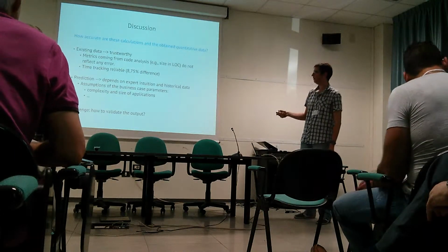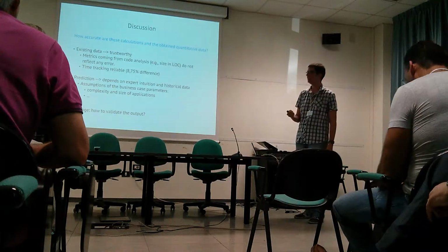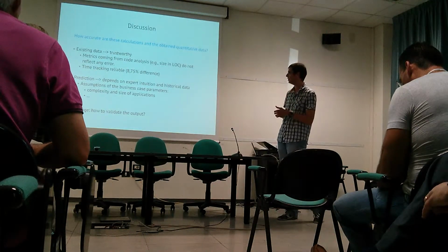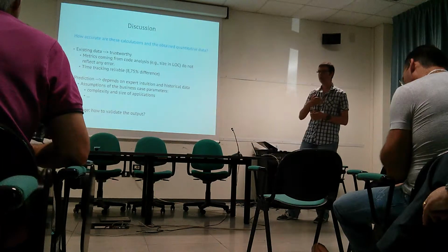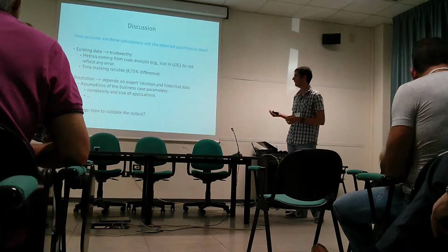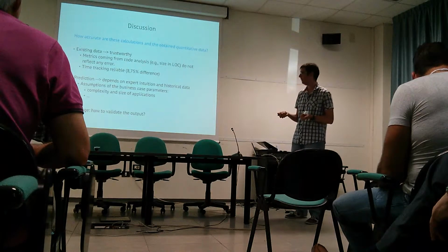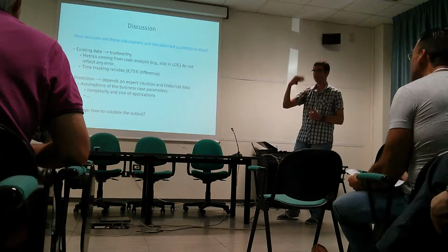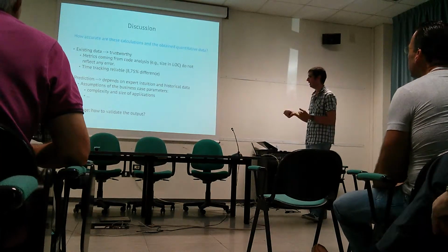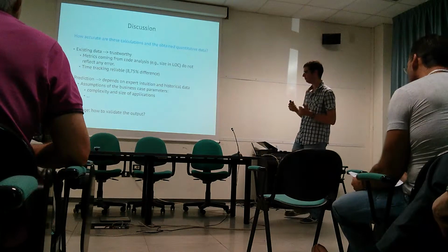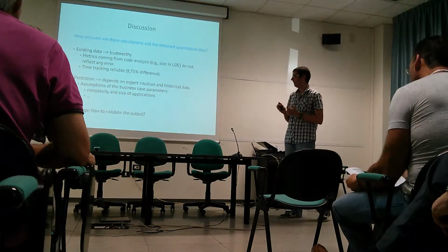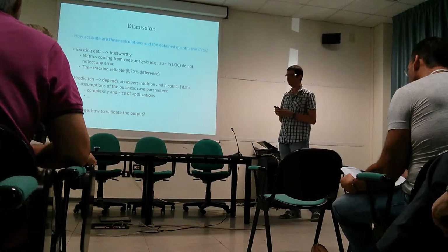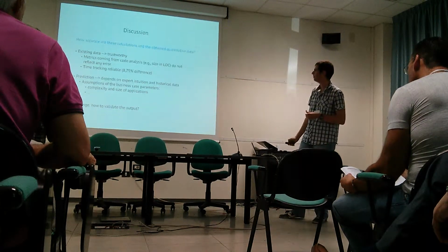But on the other hand, when we don't have existing data and we need to use predictions and assumptions, the output of the economic model depends on expert intuition and historical data, which can be very difficult to get. For instance, the complexity and size of future applications, we do not know, they are just estimations. So this is the challenge, how to validate the output of the economic model.